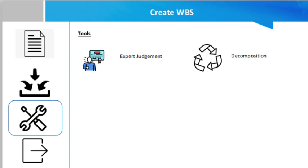The next tool is decomposition. Decomposition means breaking down the project deliverables into smaller, more manageable components. The breakdown should not be done until the cost and schedule for the work can be reliably estimated. The level of detail for work packages will depend on the size and complexity of the project.